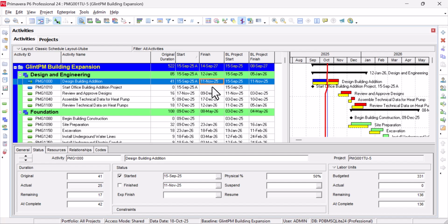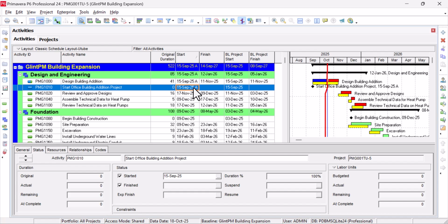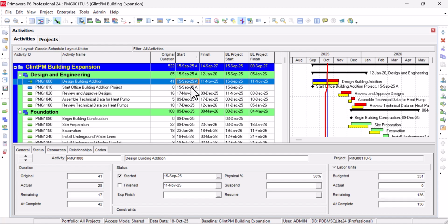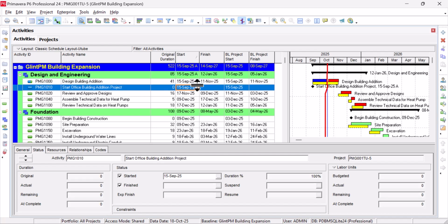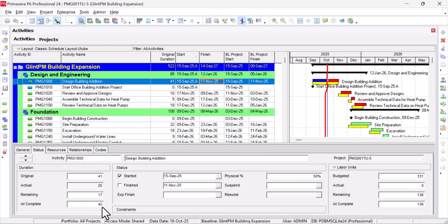It's not just doing it for the picture's sake. It must be justified by the team, the project manager and everybody concerned or working on the schedule, to make sure that those resources are available, whether equipment, manpower, or materials, to achieve this crashing. Because now, instead of 21 days, you're going to use 17 days, and you have to look for other risks associated with these activities too.